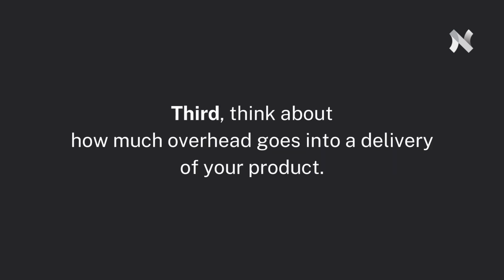Third, think about how much overhead goes into a delivery of your product. If your deliverable or solution requires a large review with many stakeholders or goes through a rigorous testing and quality assurance process that takes several days, you should factor that into your sprint length and choose a longer sprint such as 3 or 4 weeks instead.